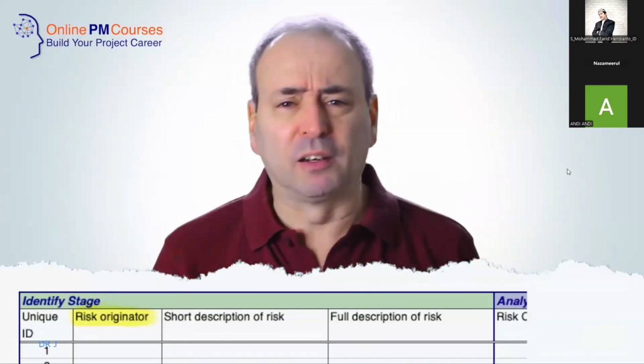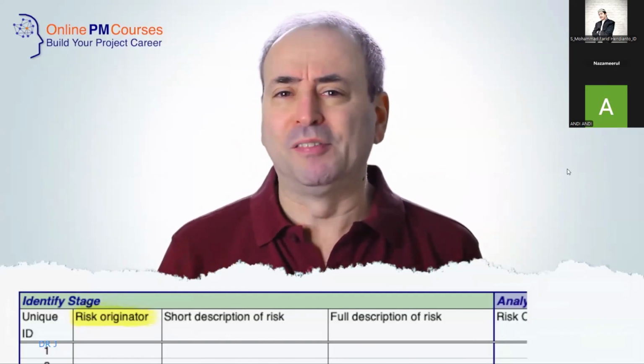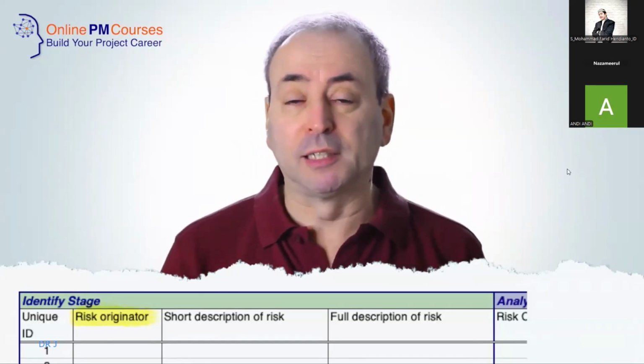Another thing I'd say is, once a risk is identified, it needs to go on the risk register. If for any reason you say, no, let's not put that on the risk register, then what happens if that risk really does materialise? Someone will remember that you chose not to put it on the risk register and therefore not to actively manage that risk. And now you become culpable.